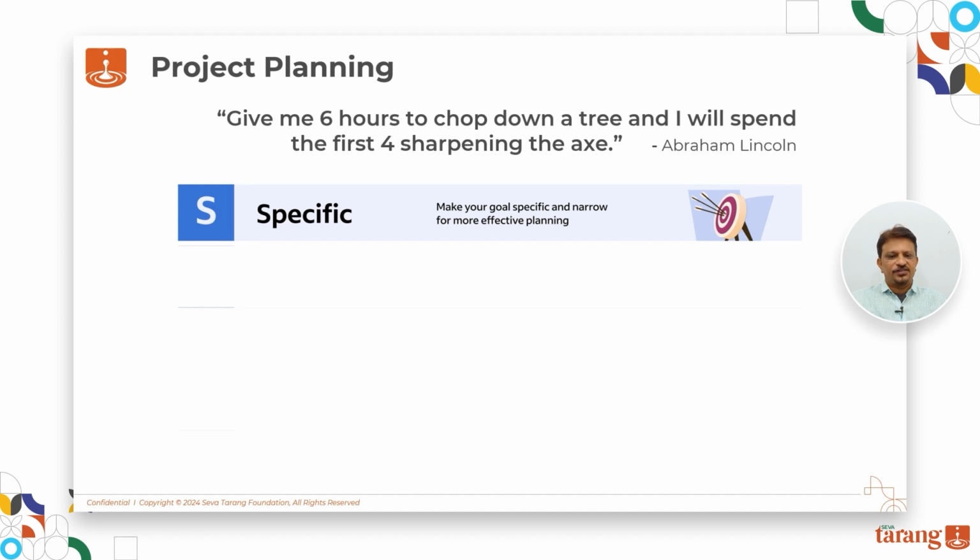So specific: improve reading proficiency among children in grade 5-6 by 20% within 3 years was the goal in the example that we have seen for LFA. So what needs to be achieved, for whom it needs to be achieved, and in what time plan is clearly defined in this statement. All of these elements make it clear and easy to understand, making it very, very specific.